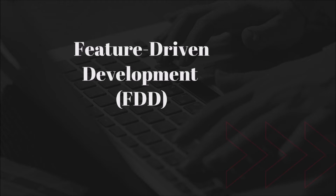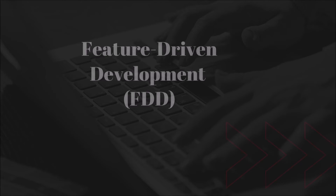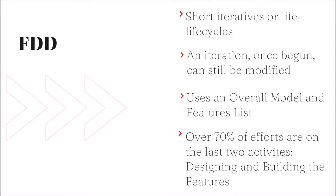Finally, we have the characteristics of FDD — Feature Driven Development. Feature Driven Development has short iteratives which are similar to Scrum sprints. However, with this framework, an iteration, once begun, can still be modified. With FDD, an overall model and features list are developed at the onset of the project. Teams then break off to work on their assigned features, and over 70% of efforts are on the last two activities: designing and building the features.